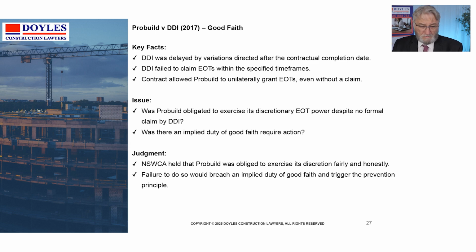The issue for the court was: was ProBuild obligated to exercise its discretionary EOT claims to give some relief to DDI? Was there an implied duty of good faith to require ProBuild to take that action? The problem, of course, was that the courts are loath to imply a duty of good faith because it's hard to define the extent of it, and it is said to induce confusion into contracts. Contracts are usually cut and dried. Usually it's like old Shylock. If you promised him a pound of flesh, then he wanted the pound of flesh that he wanted, and he asked for it.